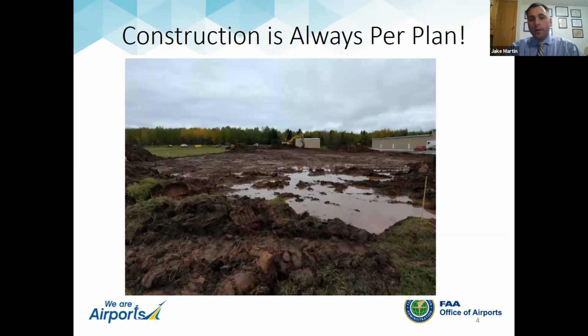We always know the minute you design a project and get a contract signed and start digging, that construction is always to plan, right? There's never an issue. Now, most of us know that there's unforeseen situations out there, Mother Nature, hidden utilities, or issues that crop up that require a change to something. Either the contractor has more effort, or more materials are required than what was originally in the plan, and that changes the pricing structure. Of course, a good design, good planning, proper coordination can help minimize these things. And sometimes projects come in without any change orders, but they do tend to come up.